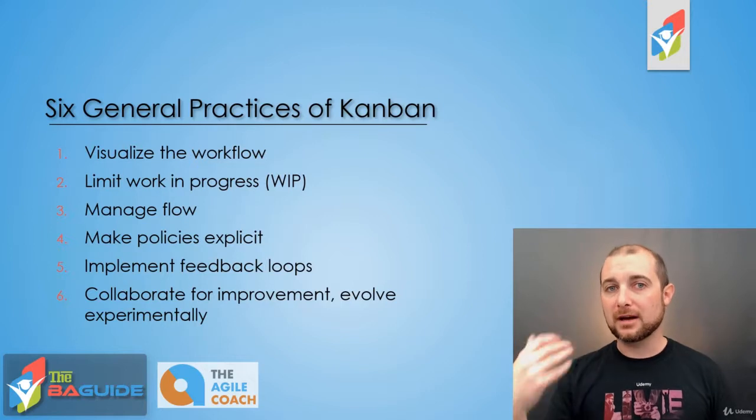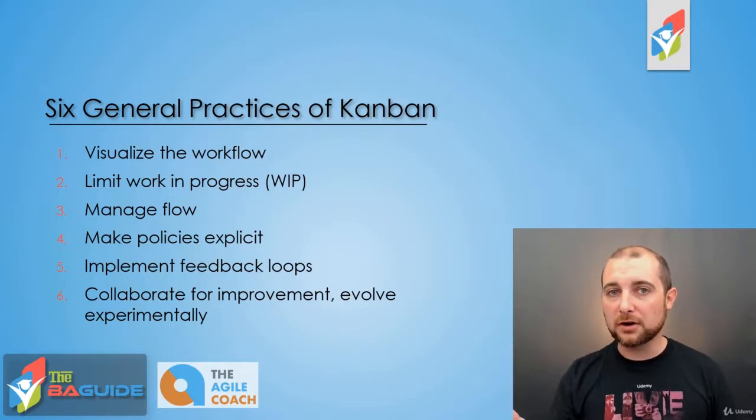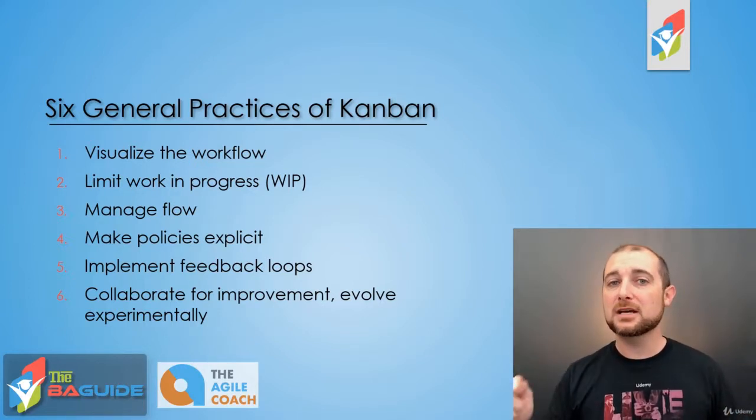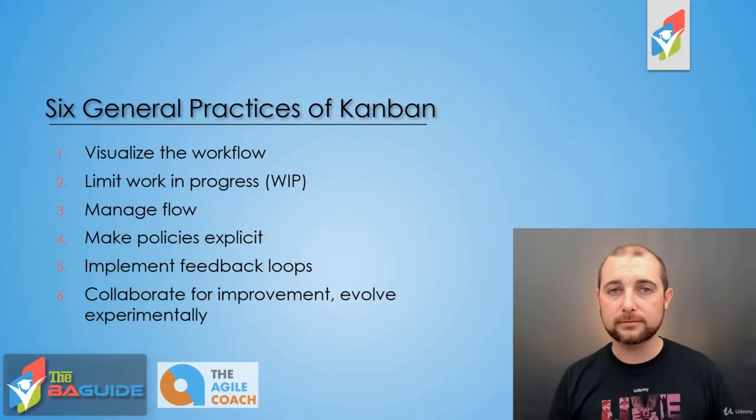The thing about Kanban is stop starting, start finishing. It's not about starting a million tasks. It's about completing tasks, delivering those small amounts of incremental value to the organization. So number 2, limit your work in progress.